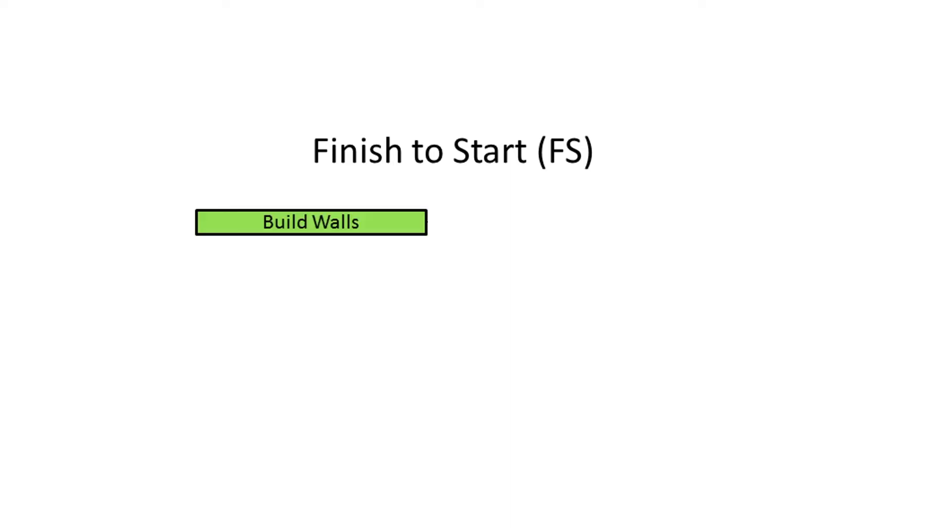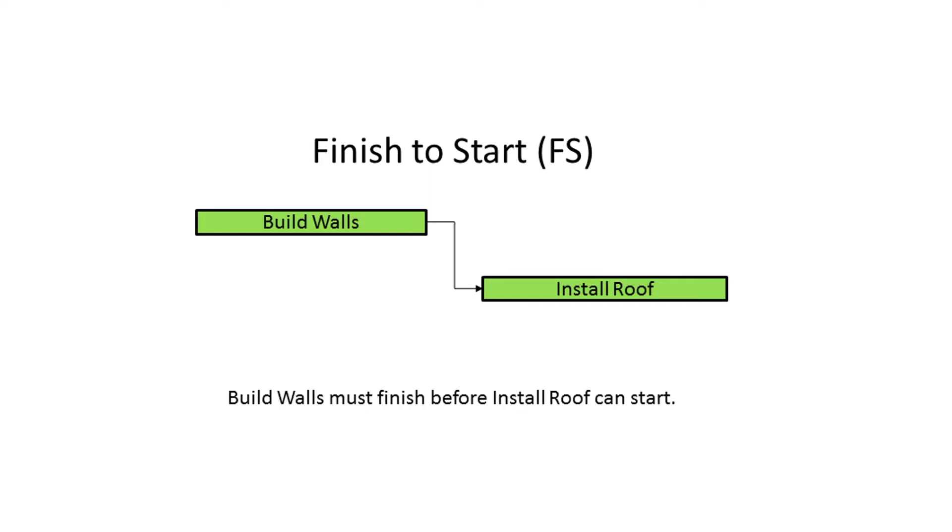By far the most common is the finish-to-start relationship. This relationship type describes the following: the preceding activity must finish before its successor can start. In this case, you must finish building the walls before you can start installing a roof.